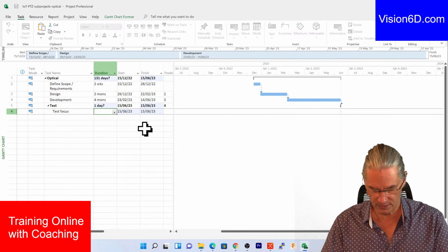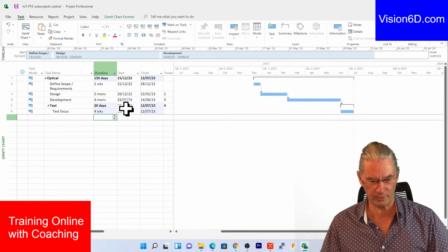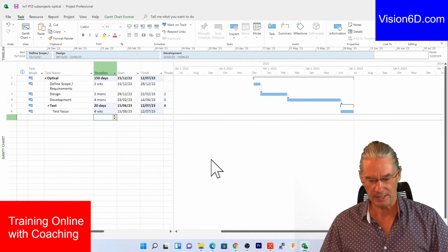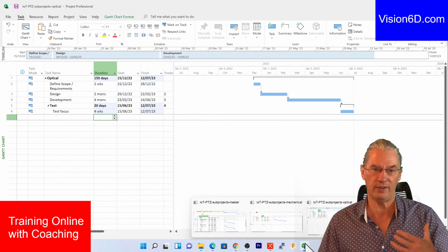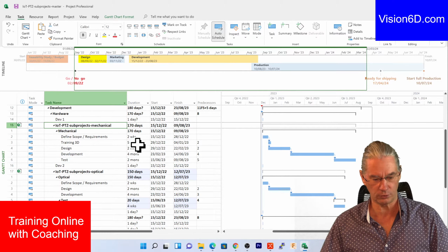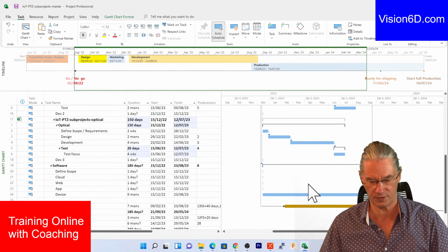And this test lasted 4 weeks. So I'm again bringing those 4 weeks here inside. And you see now I've added a task into the sub-project, and I'm going to have a look into the master project. And you see here in the master project that we have the same.